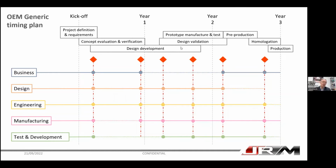Although they communicate across teams, the gateways are the point where officially everyone has to show their real status on the project to everyone, and to the directors and ultimately to the chairman, so they can understand progress. The program teams work with the engineering teams to pre-prepare documents that describe the status, the level of risk, etc. So to go through the gateway, the engineering teams present how they've solved the problems, where they are against plan, and what outstanding risk might exist. And then the senior managers make a judgment on whether the team can go through the gateway.